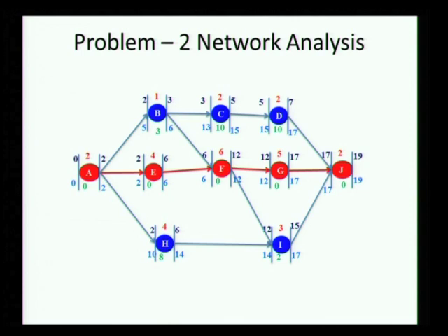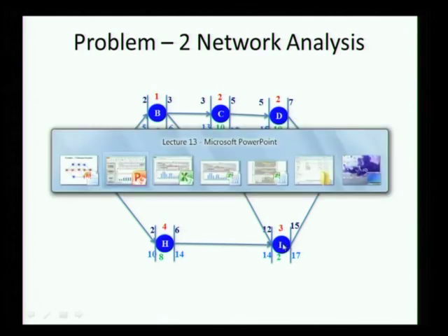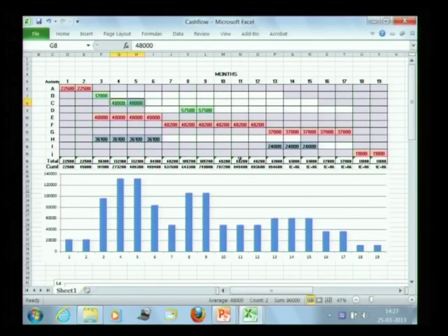Okay, you have to go back to the network. I can't move B beyond C. If I move D, then it gives space to move C. So remember that you have B, C, D. They are linked, and H and I are linked. So here you have B, C, D. Right now, yes, C can move, but it has to stop here because it can't move beyond that. Once C moves, B can move.